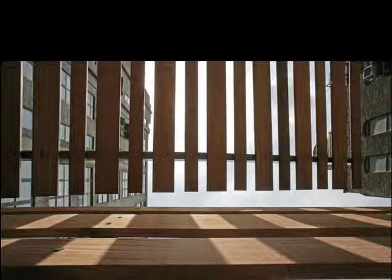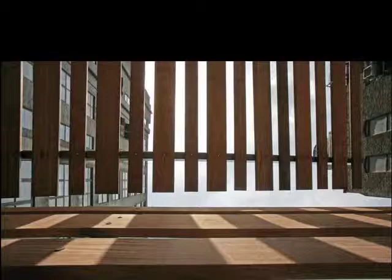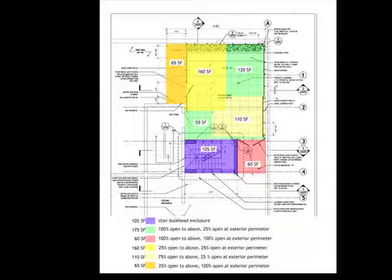on the project. We had some complications with the building department when we were trying to get the permit for this job. We were actually rejected at first because the building department has an interesting interpretation of enclosed space. So the building was overbuilt, being an older manufacturing building, and we couldn't add any additional square footage. Now, they were deeming this space to be enclosed space, and we had to prove to them with some back and forth of the amount of porosity of each space and the trellises and how much light would come in. So we did prove our point, but it was quite a struggle.